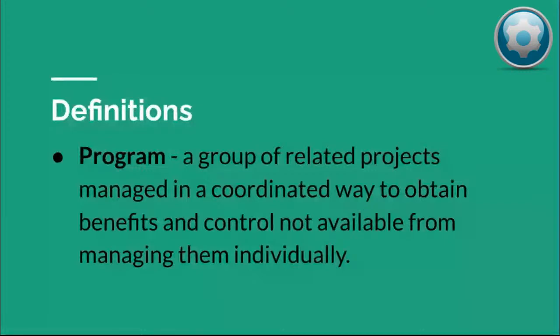And there's one part that's not included in this definition. This came straight from PMI, that we're talking about common deliverables. And that is the main driver of a program, because if you have multiple projects and the deliverables have nothing to do with each other, you don't need a program.